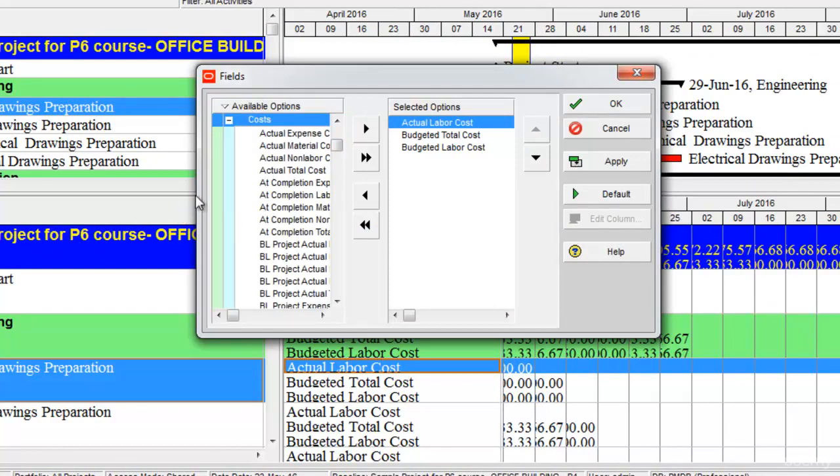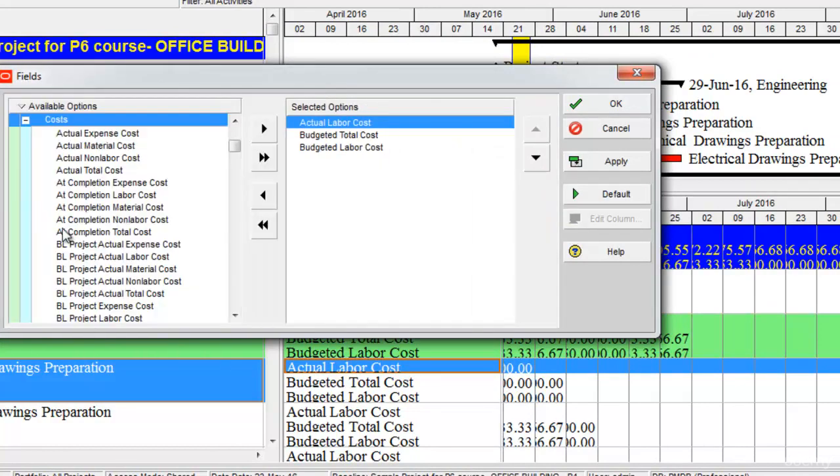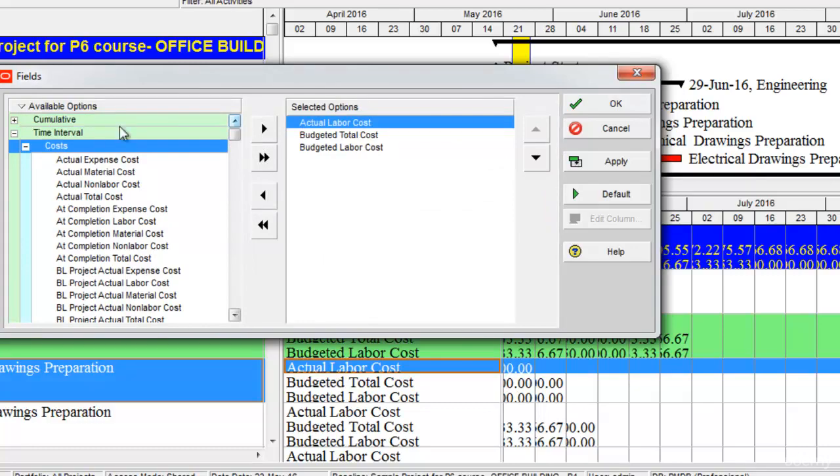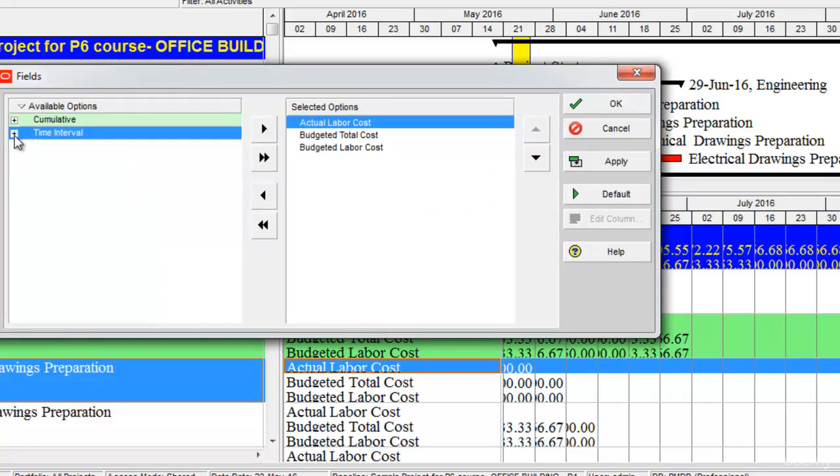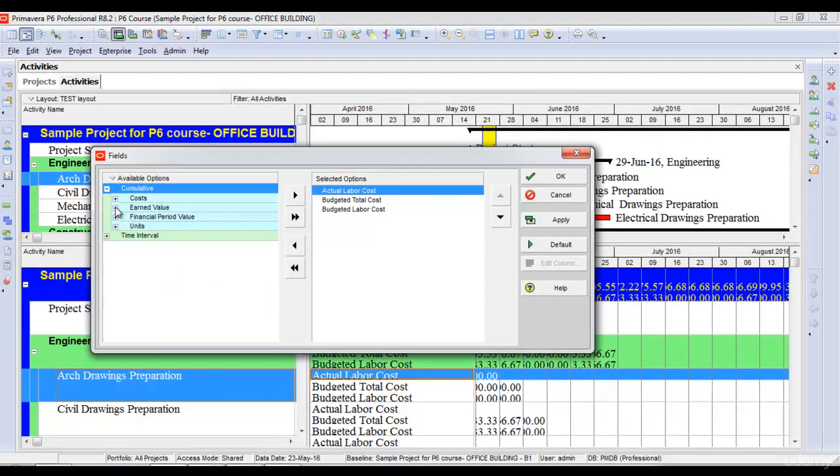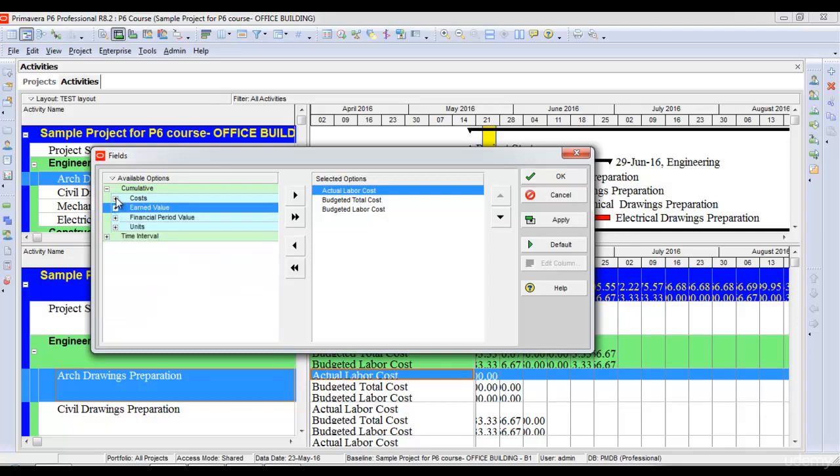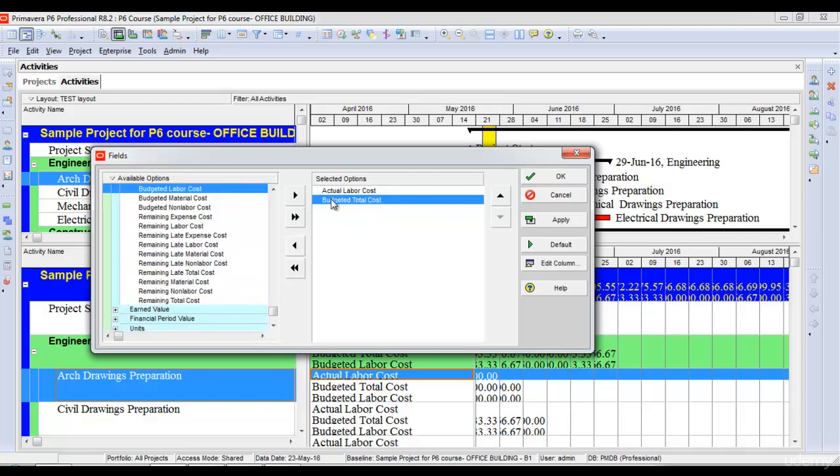budgeted cost, my at-completion cost, my actual cost of the project, and so many other things. This can be seen in terms of time interval as well as cumulative values. For example, I can see cumulative actual cost, cumulative estimate to complete, cumulative planned values, and so on. Let's say I select budgeted total cost